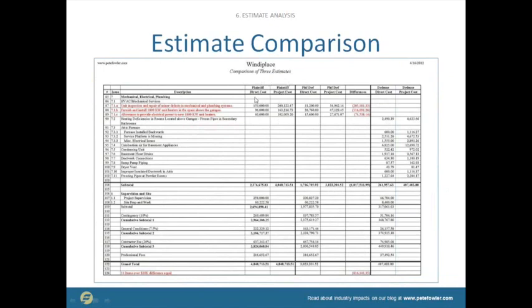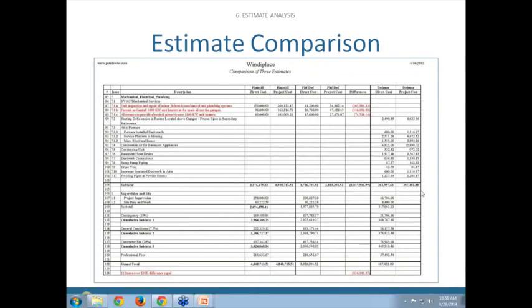And by the way, we do this exact same matrix for construction projects. When we're operating as an owner's representative or a construction manager, we will do the estimate breakdown. We will have asked for bids in a certain way, and we just literally put them in a column. So contractor A says it's $4.4 million, and in this case, since it was a litigation, the plaintiff's estimate was $4.4 million.